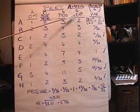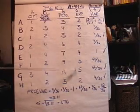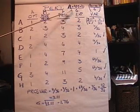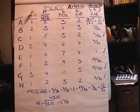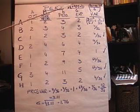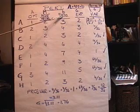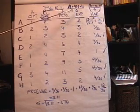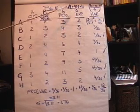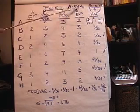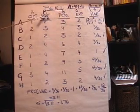In the next column what we've got is the expected time then. The expected time is calculated by taking A, which is the optimistic, plus 4M, which is the most probable, plus B, the pessimistic, and divide that by six. So it's like a weighted average. You're putting a weight of one on the A, and a one on the B, and a weight of four on the most probable.